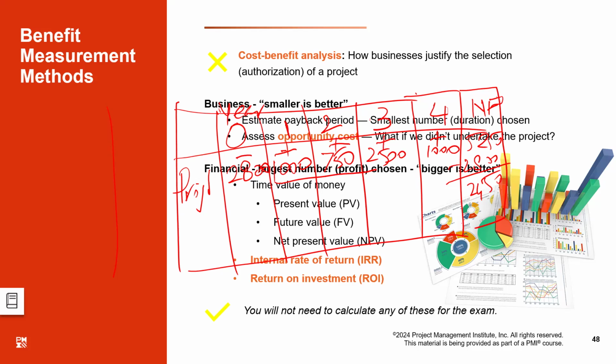So if I am paying from a loan amount, I would always desire my project to finish as early as possible and break even as early as possible. So I would like to pick the project which has the shortest payback period. That is good for me.